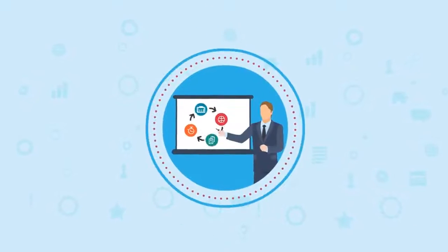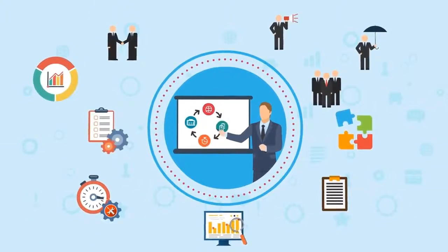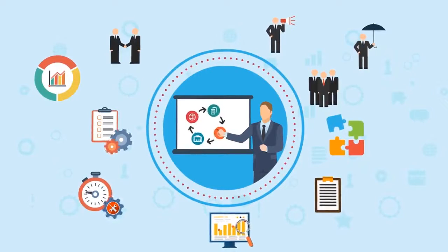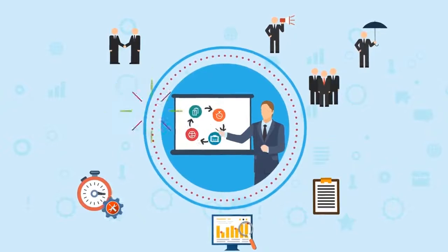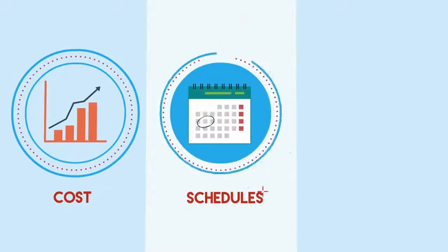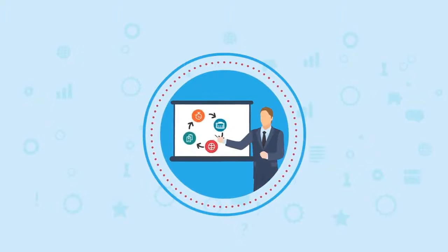Scope creep is what happens when the scope of a project changes, usually an increase, without the change being managed. Often these changes seem minor, just a tweak here or there to improve things. But over time, unmanaged changes add up and can have a major impact on project costs, schedules, and quality. There are a few main causes of scope creep.